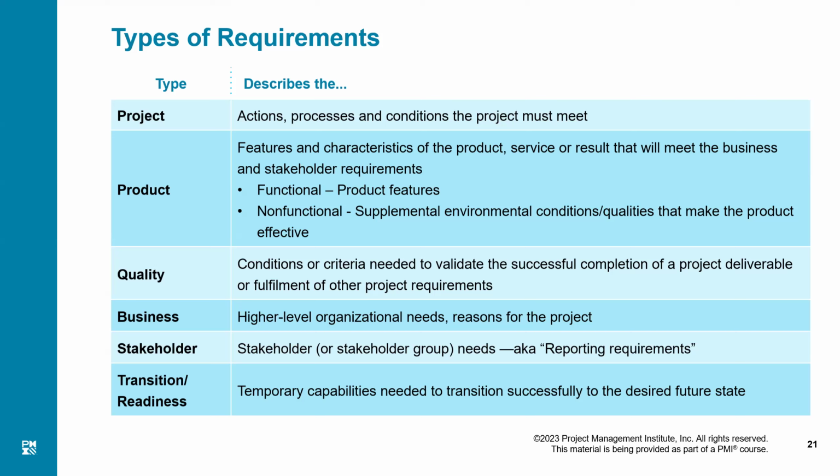So if your track of 12 kilometers is 3 inches longer or 3 inches shorter, we will consider it according to the specification, right? So what we have defined is the tolerance in that requirement, that a 12-kilometer track may be acceptable to the customer if it is plus or minus 3 inches, or whatever the equivalent in the metric system is. We call that also the pass and fail criteria.